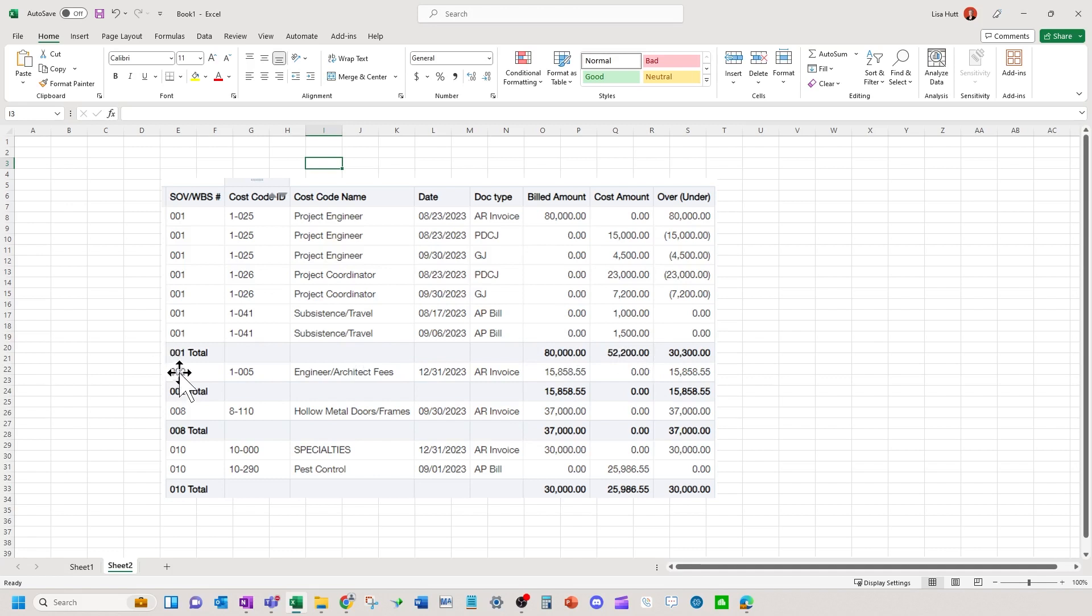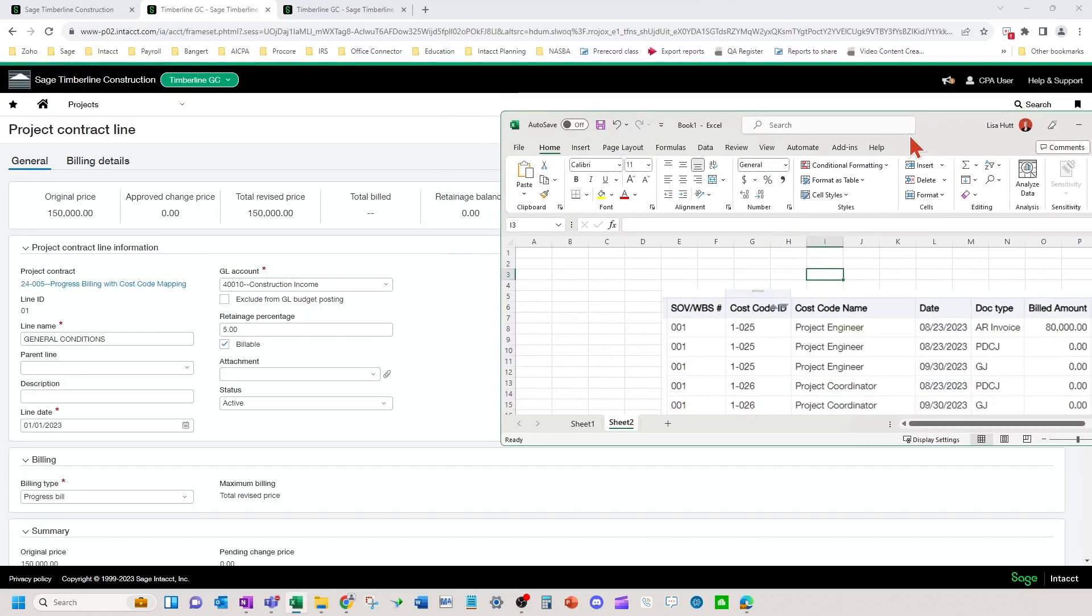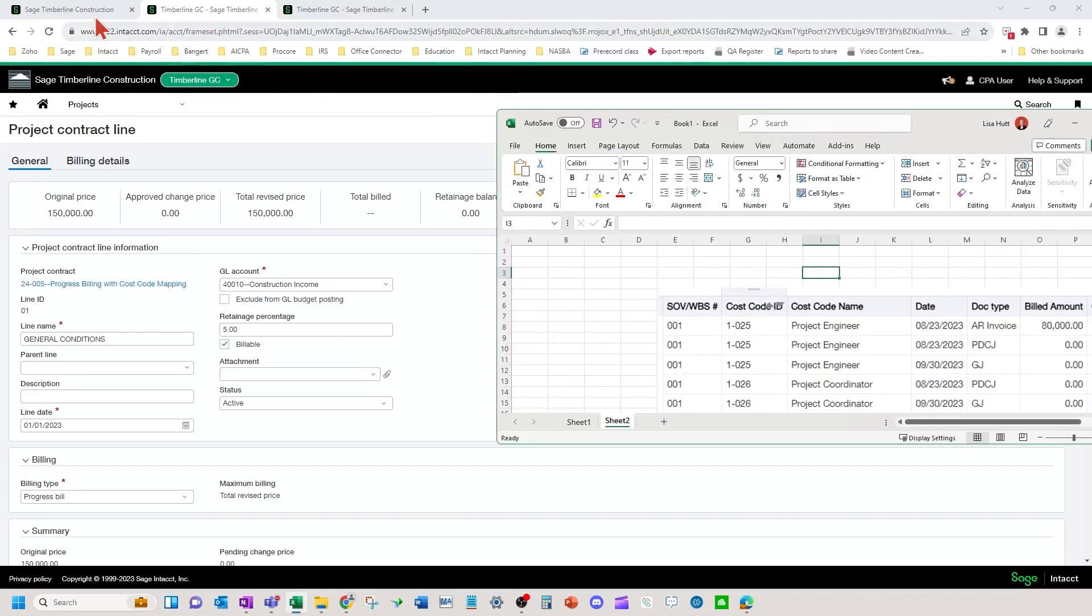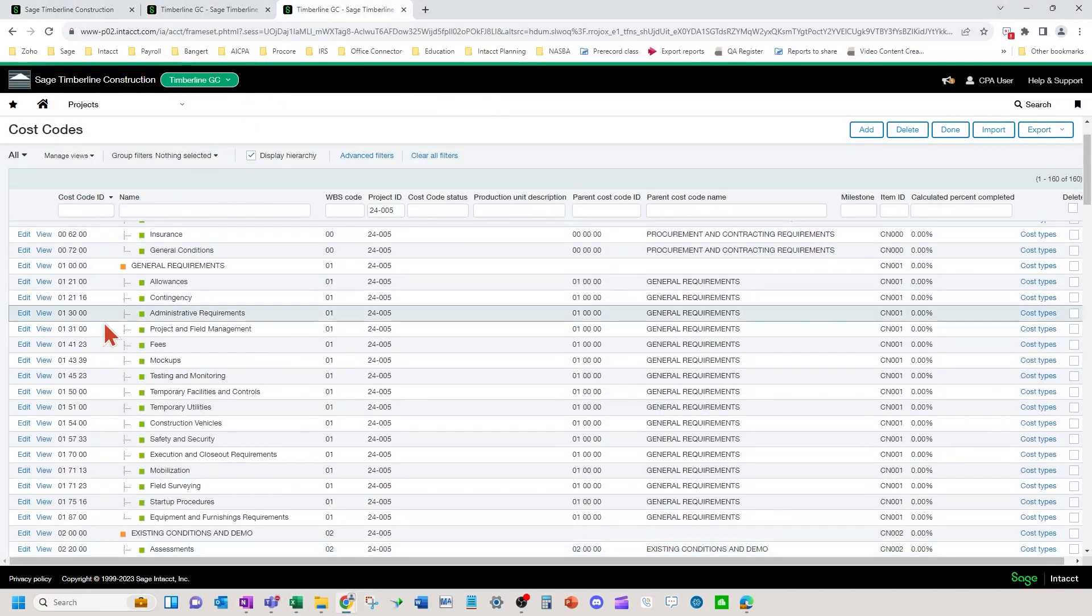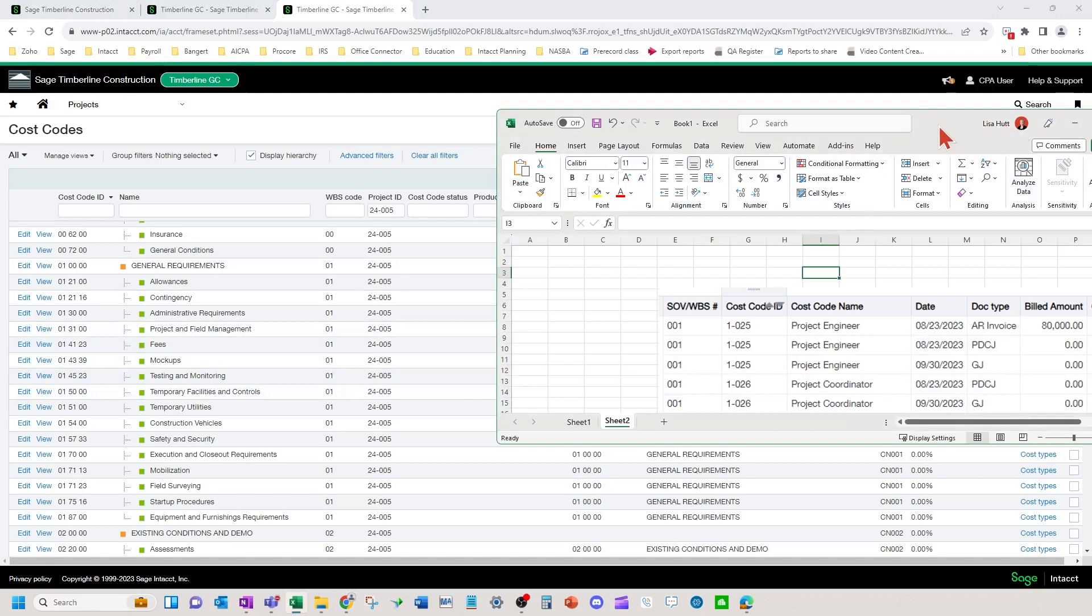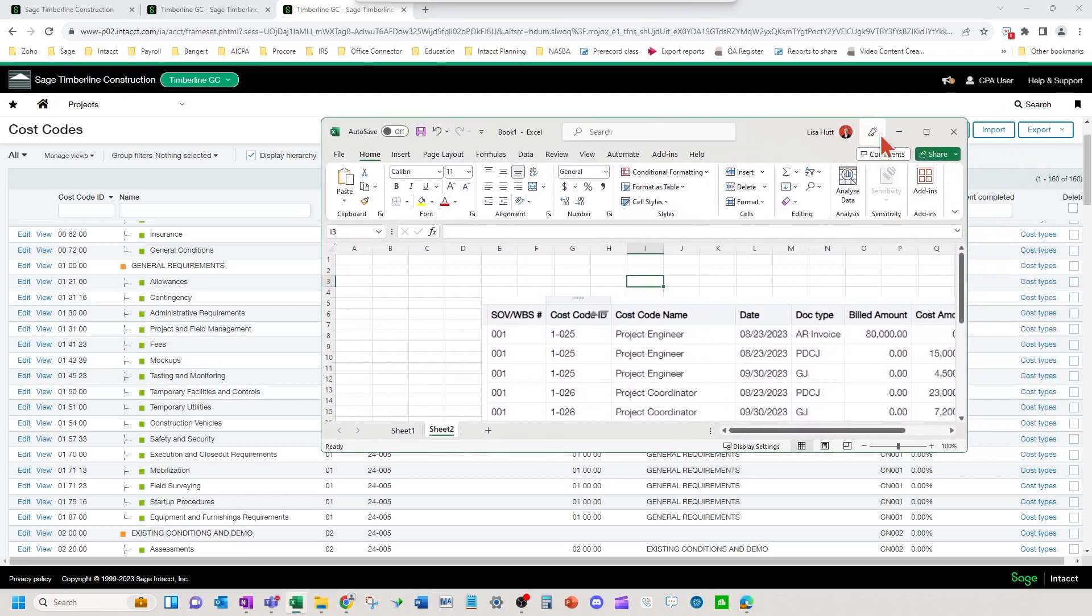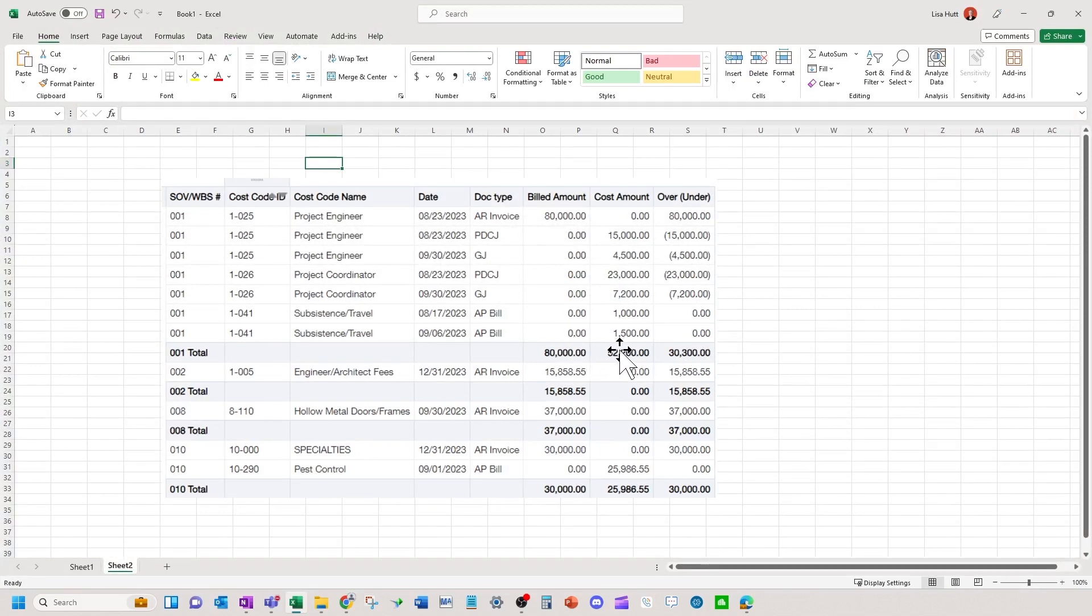Now this second line here is a scenario where I don't want 1005 to be up in the 01 schedule of values line. I want it to be in the demolition area. So the 02. So we edited that specific cost code on the cost code screen to have the 02 WBS code to go to line two. So this is a setup that can be deployed if you're looking to match up what you build for your on your schedule values lines compared to what costs came into the system.